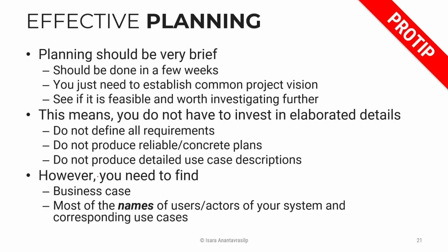This means that you don't have to invest too much in detail. You don't have to define all requirements. You don't have to produce reliable concrete plans. You don't have to produce detailed use case descriptions or lists of users or whatnot. Just have one or two, maybe three pages of documents, and I think that should suffice. Don't invest too much. You need to find, however, a business case. So what it means is that you need to know what you are doing, what kind of problem you want to solve, what your solution is, and then whether it would make you money.